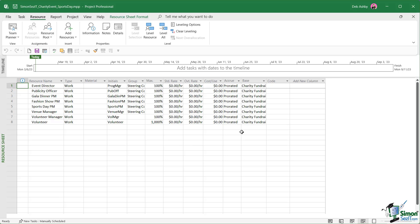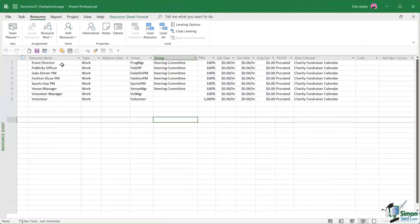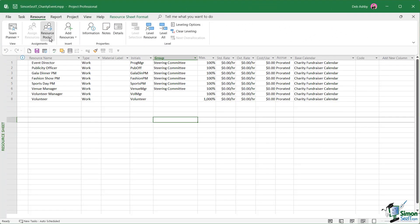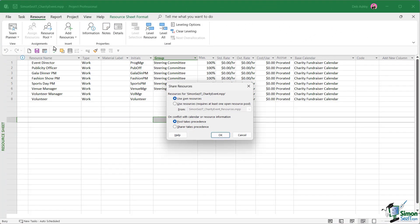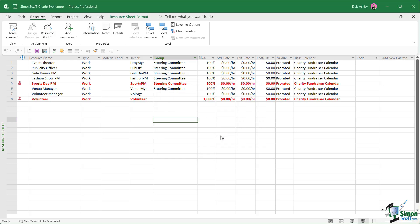The other thing that we need to do is we need to get the original file, the charity event project, to use the resource pool as well. Let's open it up. We're going to do exactly the same thing. We're going to jump up to resource pool, share resources, use resources from the charity event resources file. And once again, the pool takes precedence. Let's click on OK. Notice that as soon as I did this, we now have over allocations for the sports day PM and the volunteer.